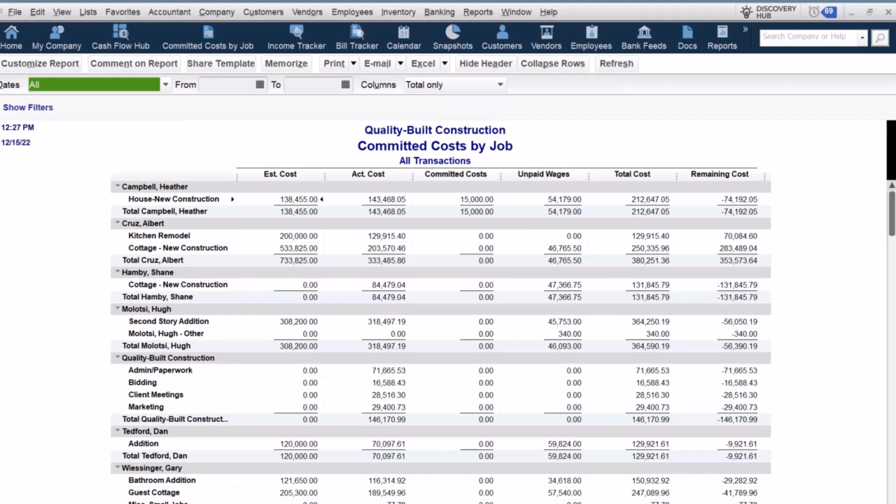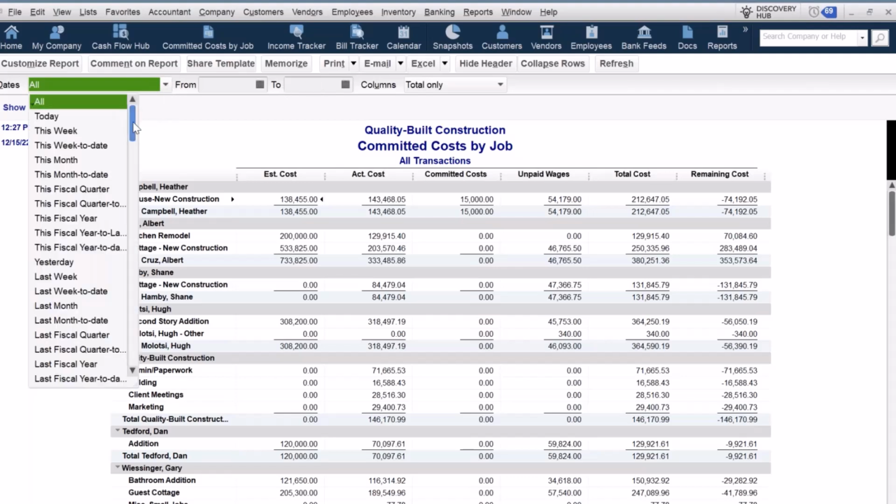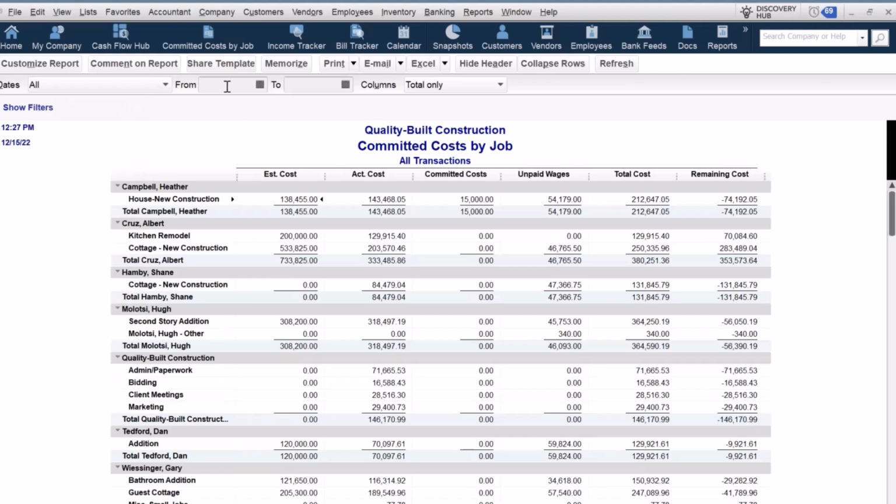One thing that I'll recommend is if we're trying to see a job cost report through the end of last month, or any of those other things that we might be filtering on that are specifically date driven, we really want to use one of the relative date drop downs. Otherwise, if we look at that report and we say, okay, we want to run it for June, and we put 6/1 to 6/30 in here, every time we click on that report from here, it's always going to run for June, even if we just really wanted to see it for last month. I would recommend putting last month here.